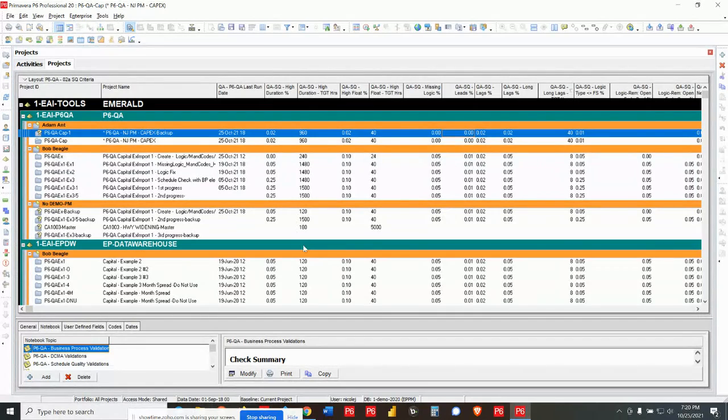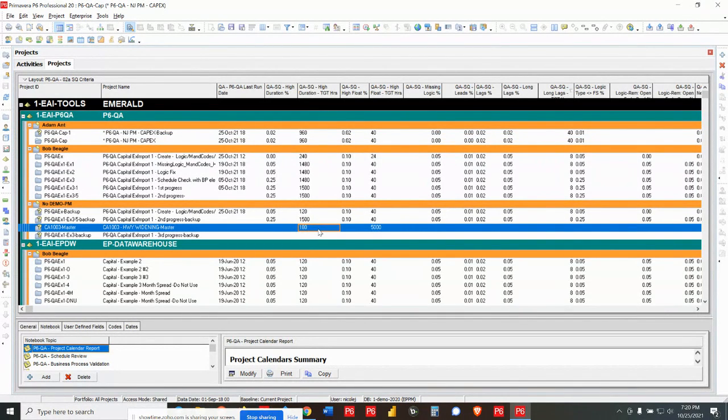We can certainly make those a smaller value, and for longer range, maybe 5, 10, 20-year type projects, you can make those longer range. So you can control some of these metrics, not only whether it's good or not good, a pass or fail, if you will, but also a range. That would be anything that has a duration, anything that has a float, which is duration based. Those can be managed not only as pass or fail, but also by range, which would give the yield sign.